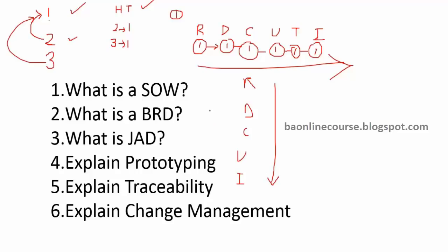Very simple. We'll look at your SOW and say in the SOW we had 1,000 requirements. So correspondingly, did we cover all that in our use cases in our BRD is what we will check. Makes sense, right? We'll pick up the SOW. There are 1,000 requirements in it. We'll check, okay, first requirement, is it complete? If yes, then you'll put in a tick mark and then move ahead.